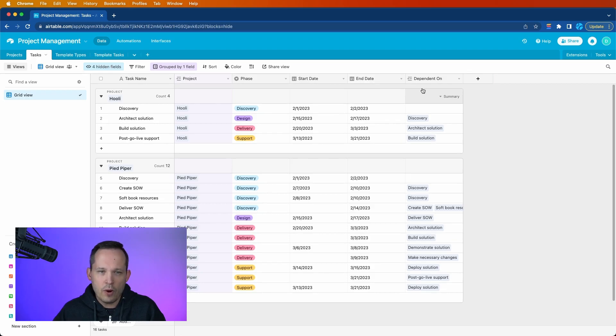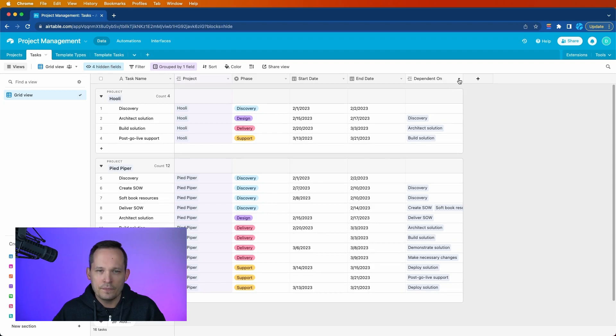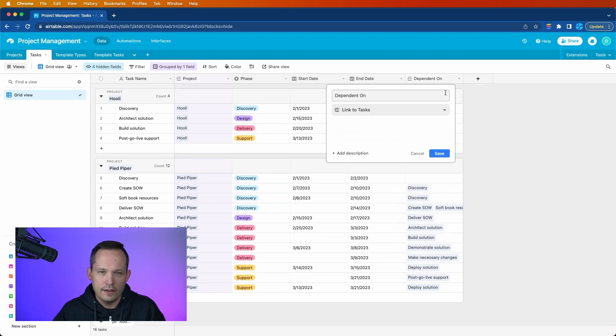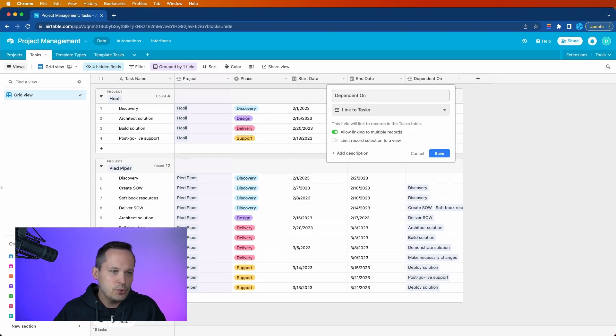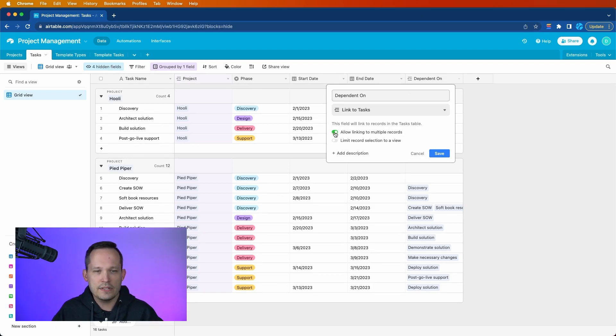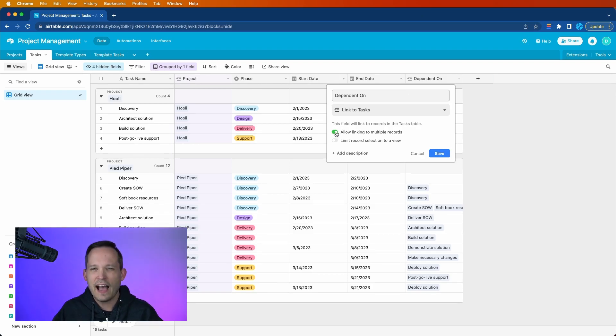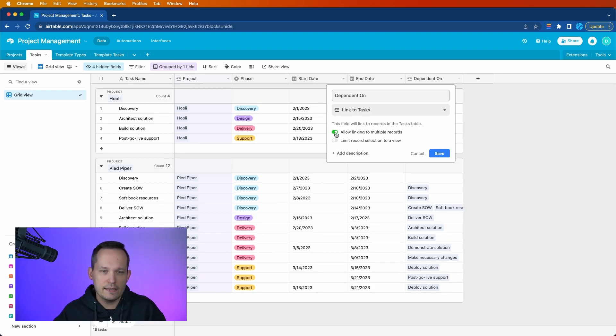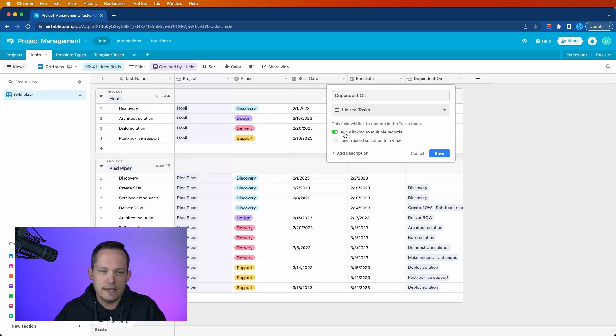And then we have one more field, which is a little bit unique. And this is for our dependencies. And what I've done is I've created a linked field here. Now, if I edit this, I actually linked it to the same table. So I'm on the tasks table, and I linked it to tasks. You have the option to say whether you want it to link to multiple records. I would if I were you, just because we know that tasks could have multiple other tasks that they're dependent on, but this is your preference. It doesn't have to link to multiple records.